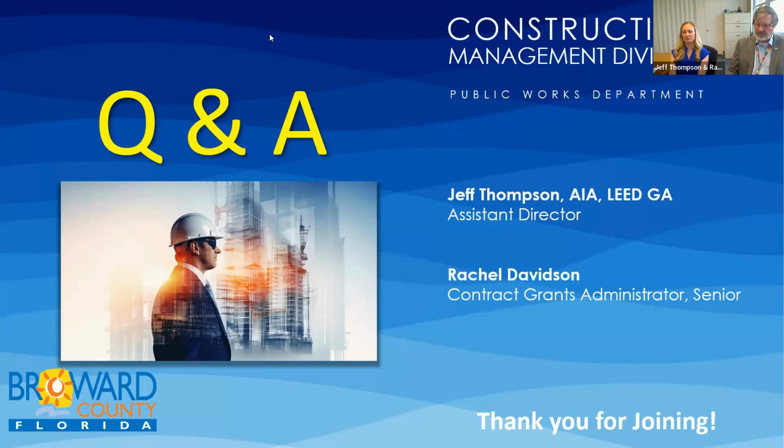Now, when we're working with managing general contractors, where we actually do have someone we can talk to before the bidding is complete, we'll often speak to methodologies to pre-purchase materials, whether under a tax savings plan or some other methodology, to try to secure those long lead item pieces like generators, main distribution panels, and the like up front, chillers also, so that we can establish what those prices are, get those on board, and lock in the prices early, so later fluctuations in costs don't affect us. I don't know if that answers your question.